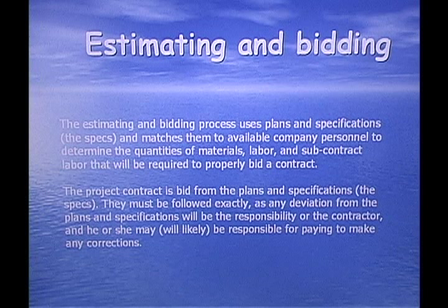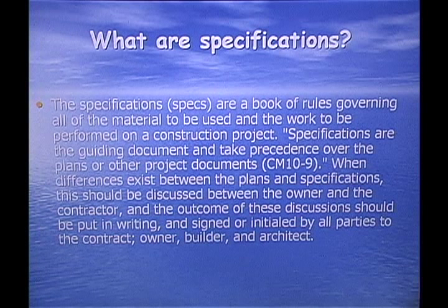They must be followed exactly, as any deviation from the plans and specifications will be the responsibility of the contractor, and he or she may and will likely be responsible for paying to make any corrections. Okay, specifications, or the specs as they're called.